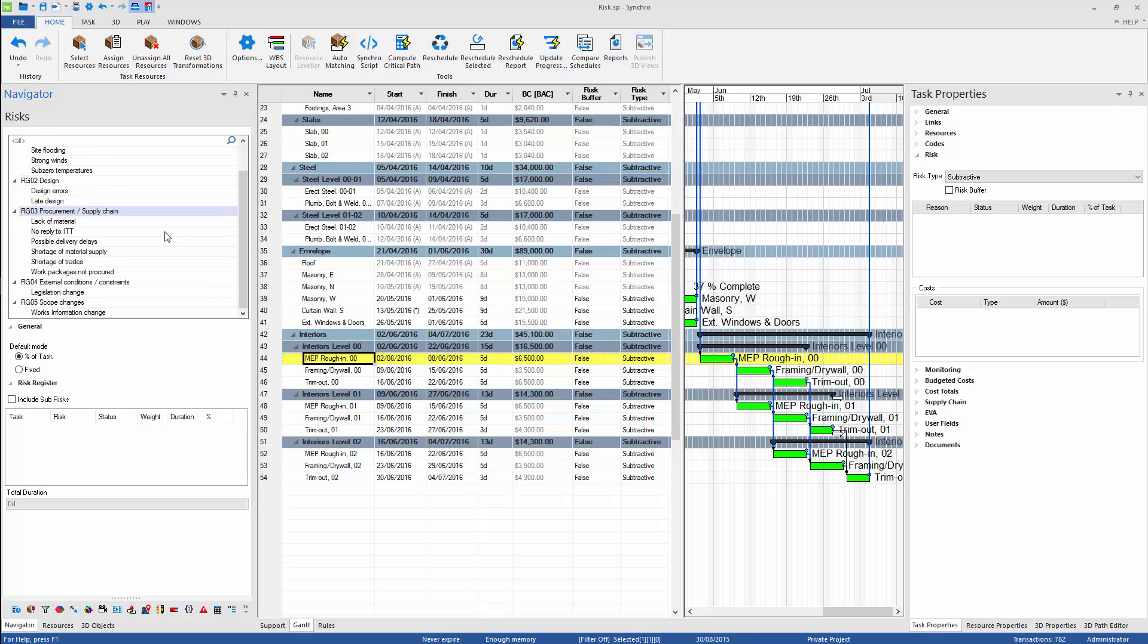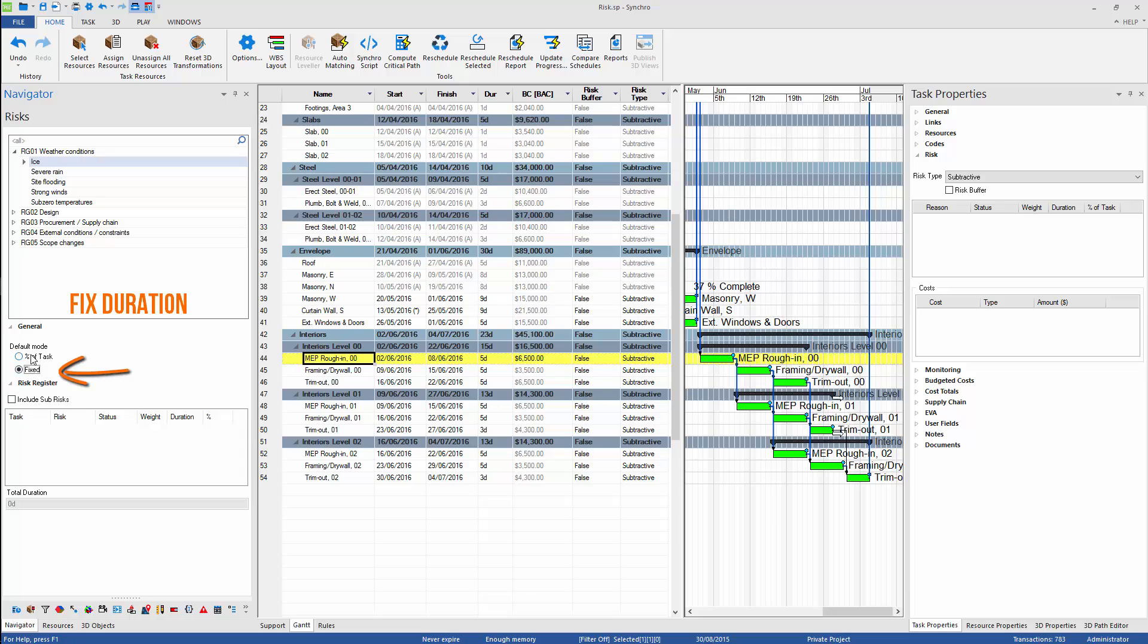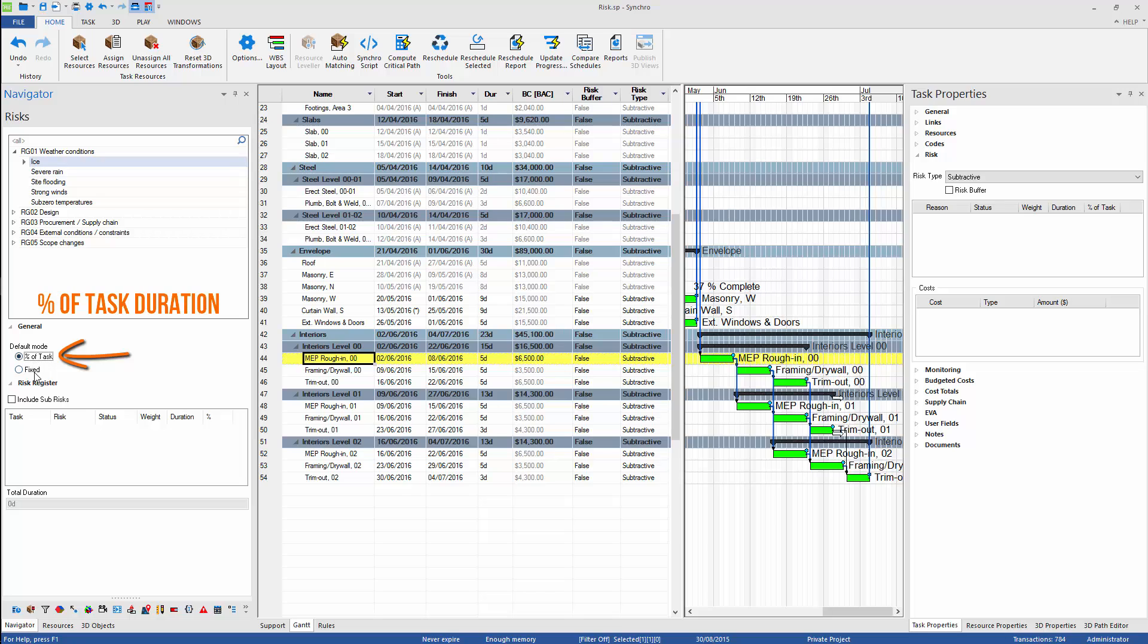We can identify risk at any stage of the project. Each risk can be defined as fixed duration of task or percentage of the duration of task. This can also be changed later.